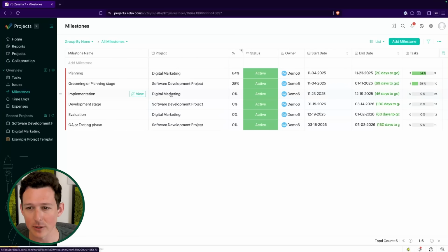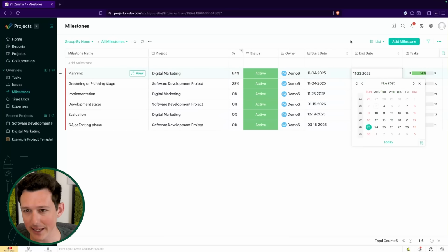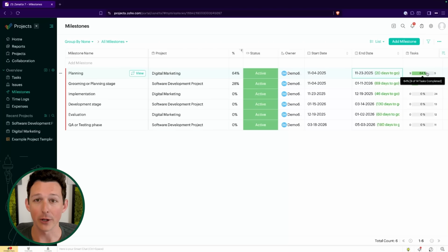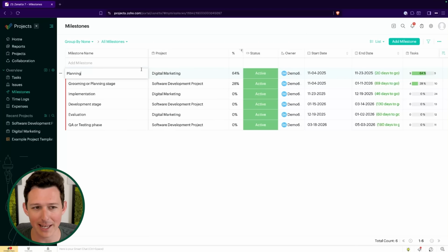Now, as a quick tour, you can see all milestones under this milestones section. Generally, there's more of a manager view where they want to check like, hey, how are we tracking against an end date and the percentage of tasks that have been completed against that. For the managers, while you're looking at this, be a little careful with this progress bar. This is the count of tasks completed. We all know task 1 through 5 might be quick and easy. Task 6 is going to take us 100 hours, right? So you do oftentimes want to drill in and see like which tasks are open. Are they the quick ones or are they the easy ones, right? Because there again is just a really big difference there.